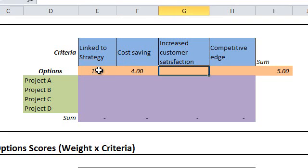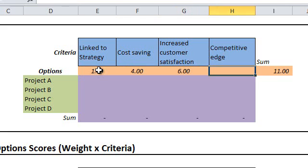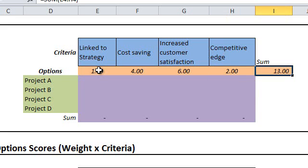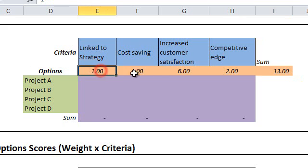So we'll assign one to link to strategy criterion, assuming it is the least important, then four to cost-saving criterion, which we think is four times as important as the link to strategy item, then six to increased customer satisfaction, and finally two to competitive edge. In order to be able to compare apples to apples, we need to standardize weights to be out of one point.